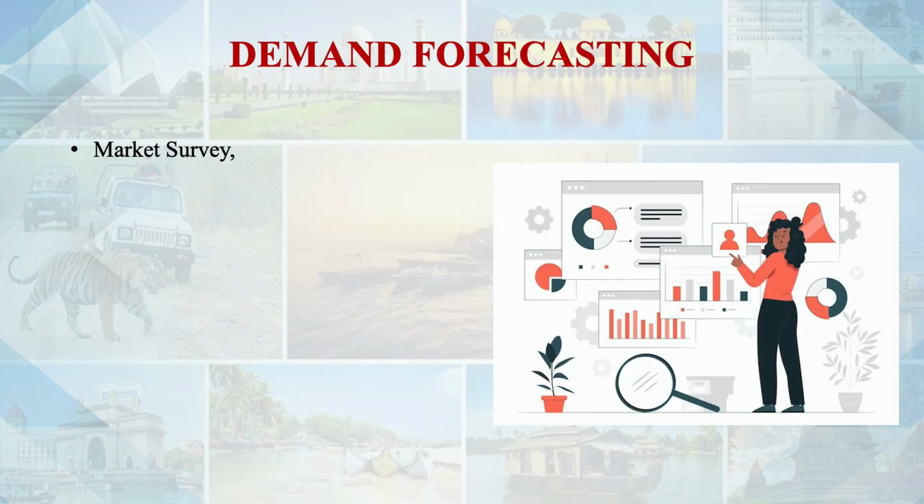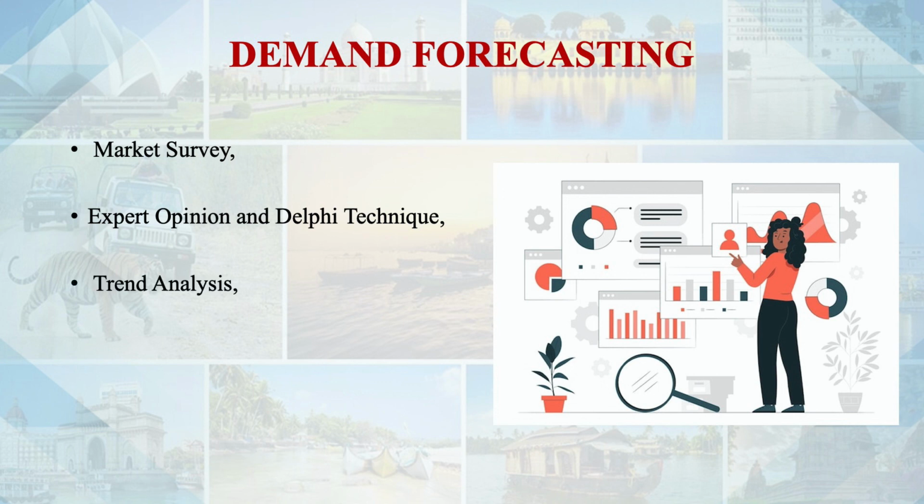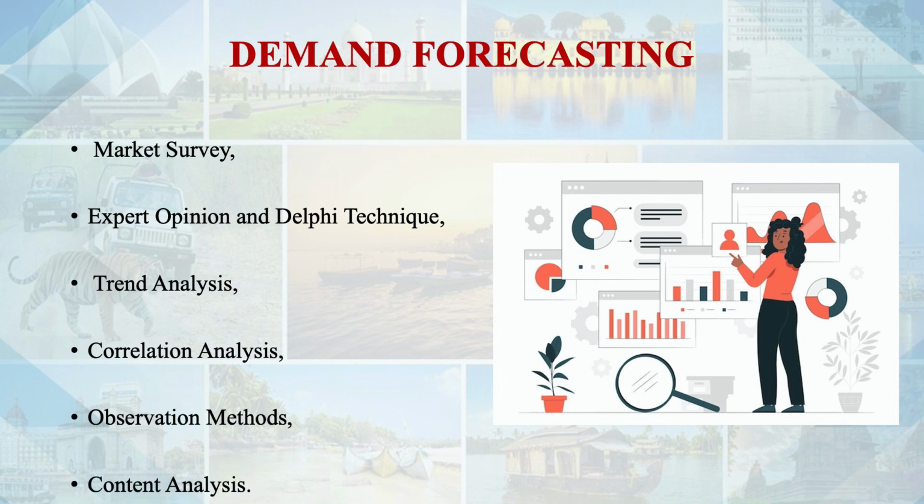Let's discuss in brief, which include market survey, experts' opinion, Delphi technique. Under Delphi technique, we repeatedly ask various experts and we try to reach a conclusion, yes, this will be the demand. Trend analysis, then statistically we use correlation analysis. Observation method can also be done if the product or such service is there in the market somewhere. Then content analysis, and these are various techniques.